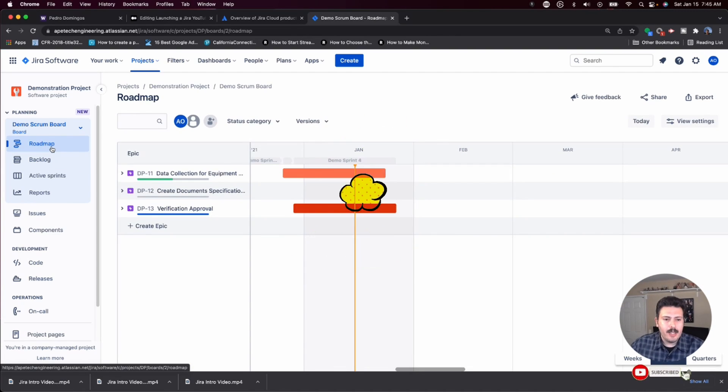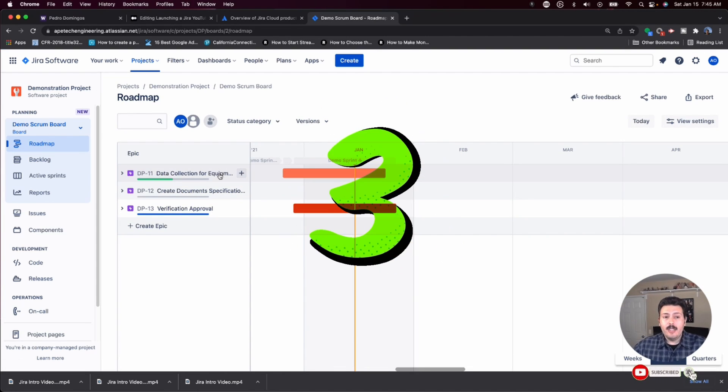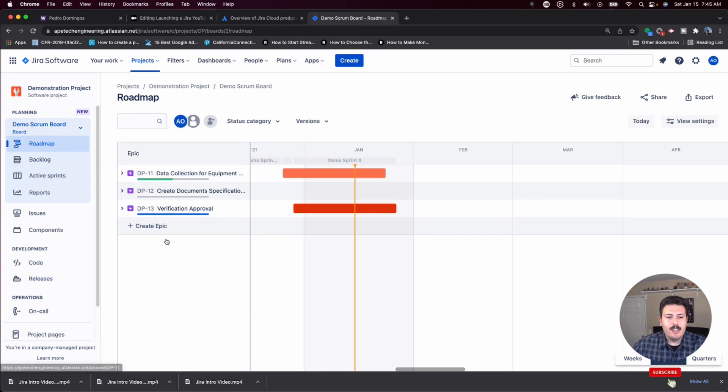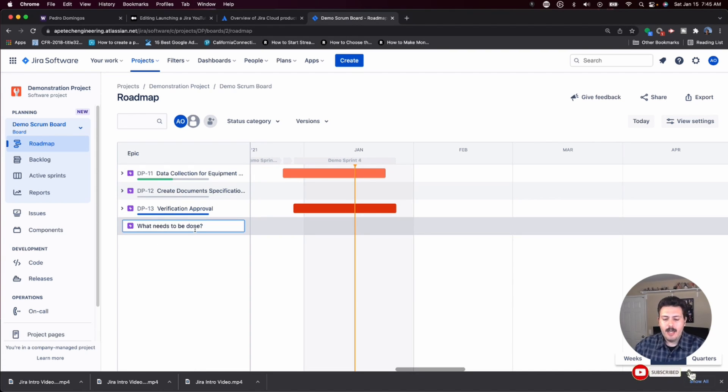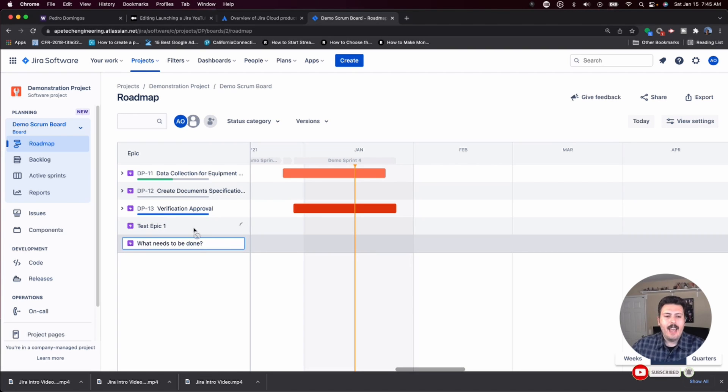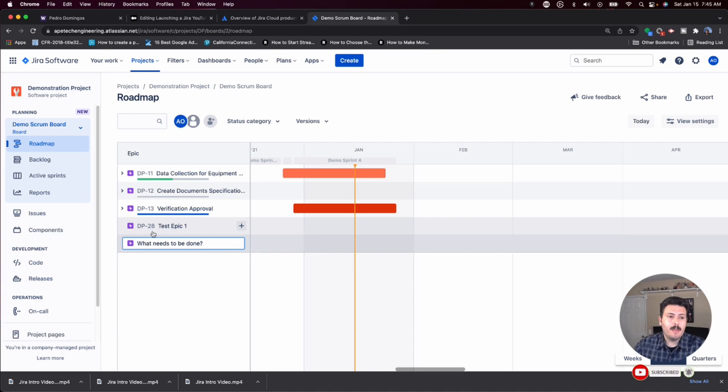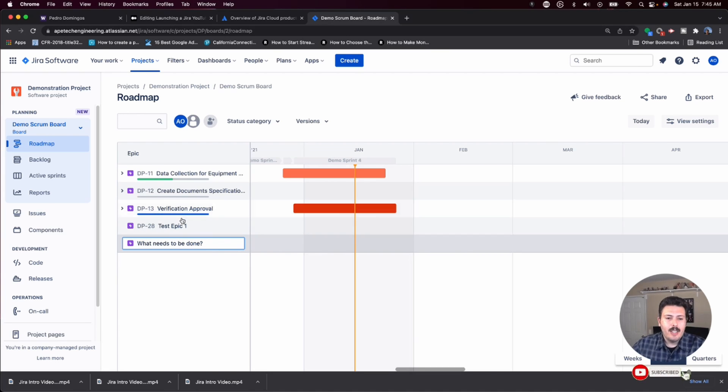Method number three is by using the roadmap feature built into every board in Jira. You can come in here and create an epic. I'm just going to call it test epic one, and that creates the epic. Again, you don't really get to pick the issue type because by default you're picking the epic, and you don't get to pick the project again because you're in the project.